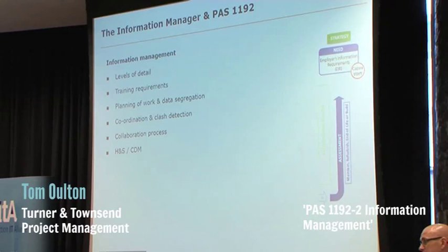We've got CDM 2015 now, which has shifted the onus on CDM onto the client side of things. So the information requirements now become particularly relevant to the client. Data security, how we look after our data.